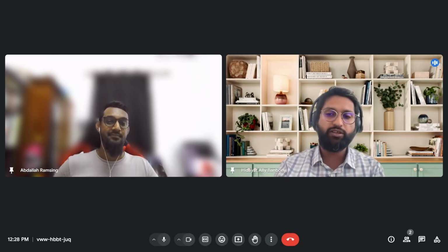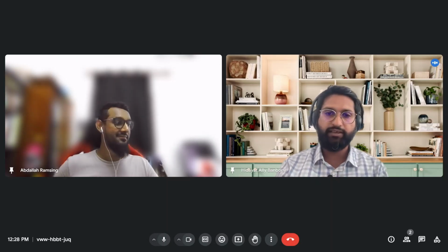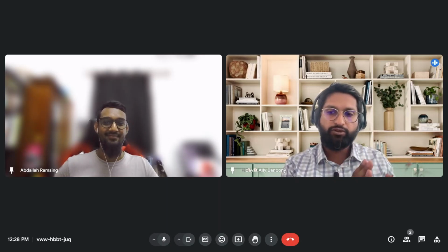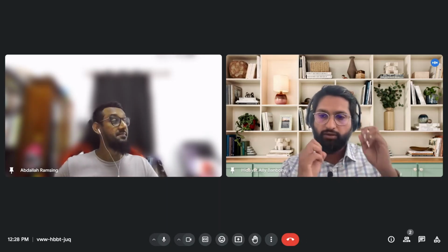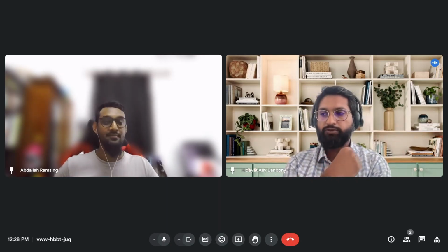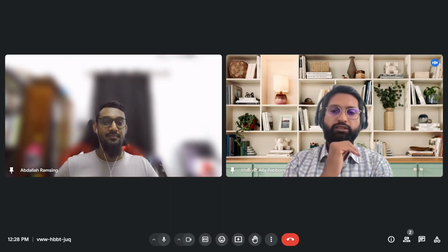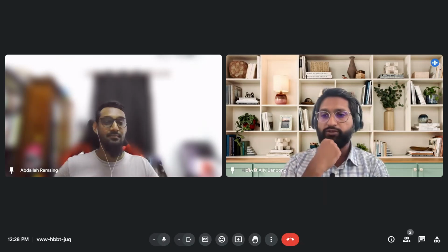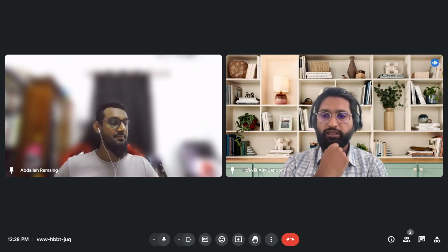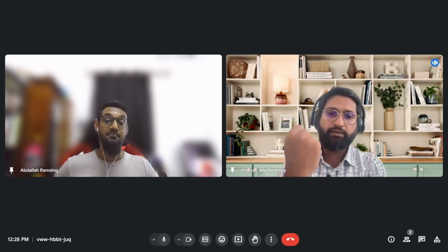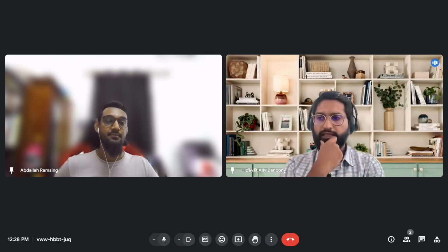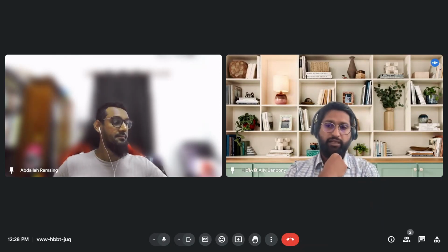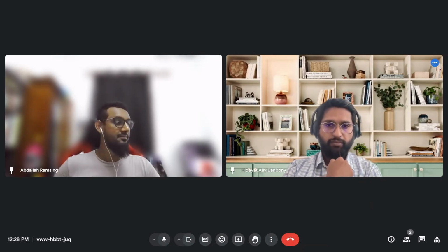So that's a bit on the sugarcoating and the white elephant things, a bit general. The idea here is to have that pre-retrospective with the person and the team in mind. Hey, I'm going to have a retrospective. These are my 3 key points. Okay, let me discuss it. Okay, these were issues that happened. Me as someone who's going to run that retrospective, I need to make the team say it themselves. Okay, we had that issue. Now, how do we solve it? So that's something we can look into.